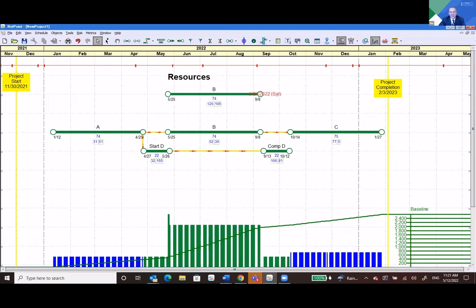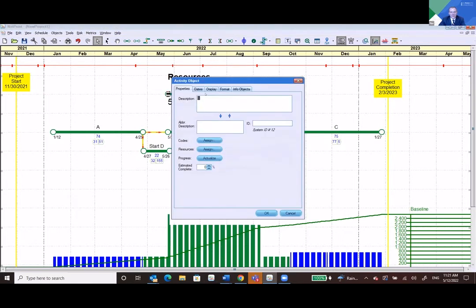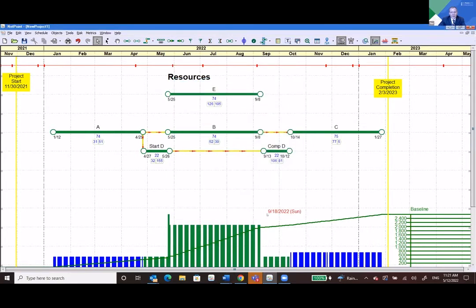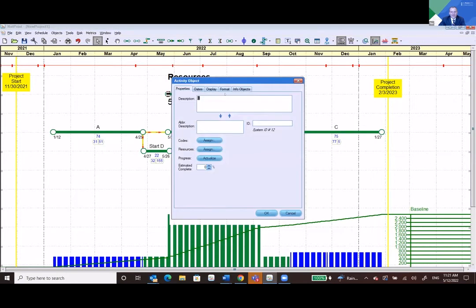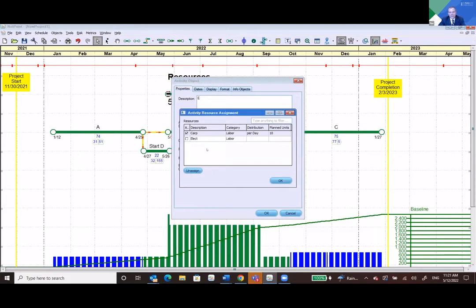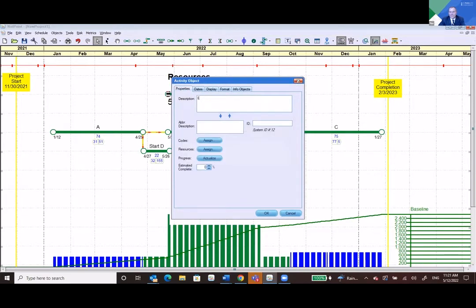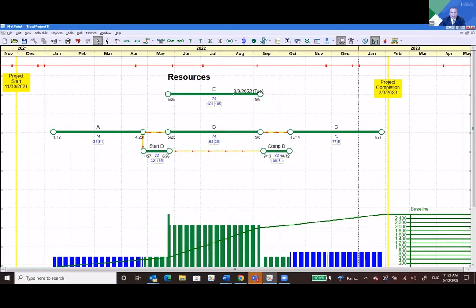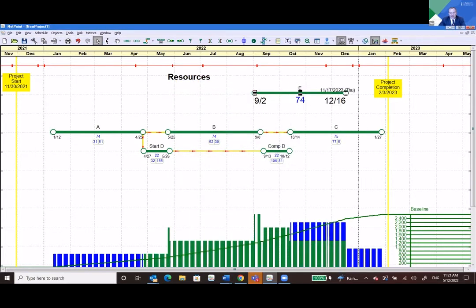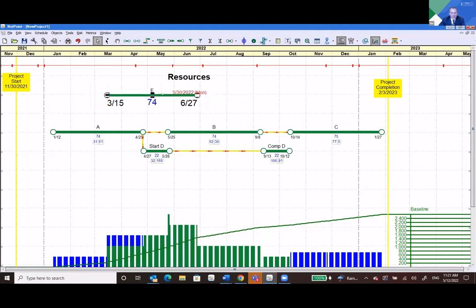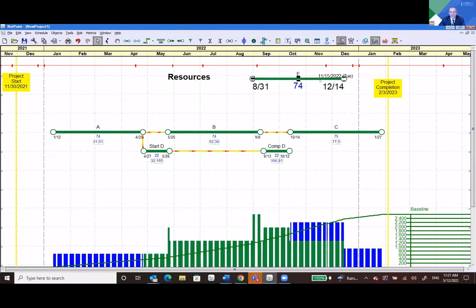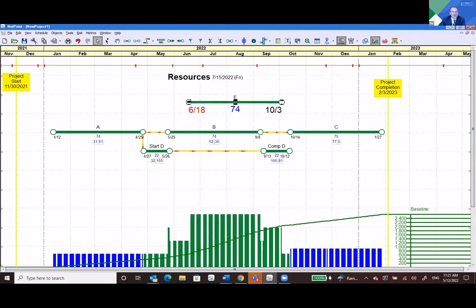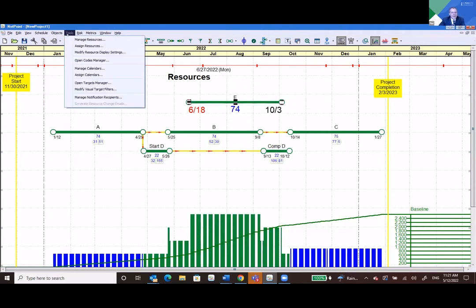That's because this version of B, which I'll call E, took the resource assignments from the activity you copied. So wherever you paste it, you're also going to have those resources. Assigned just in the same way. So if you were to grab E and start moving it, then you would see the carpenters getting moved throughout the resource allocations.